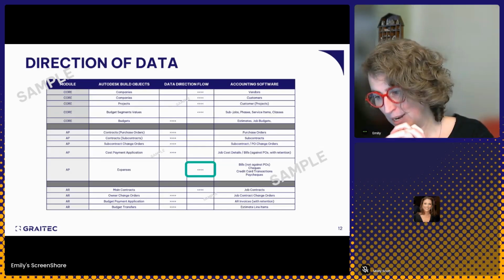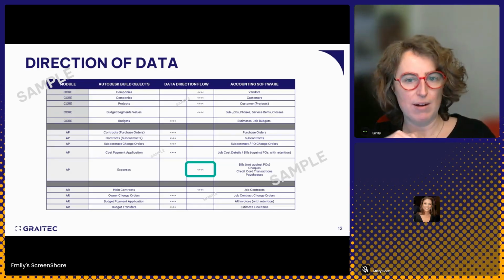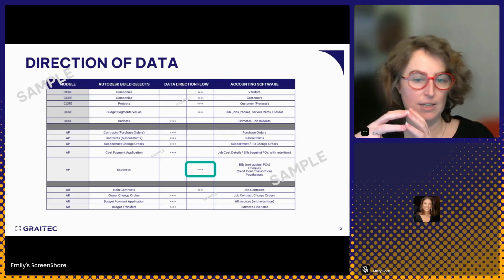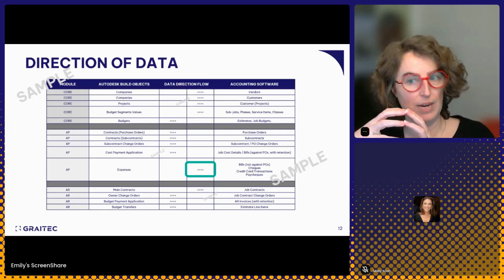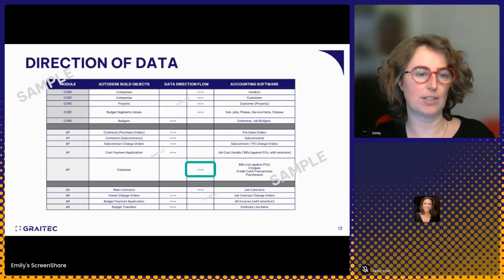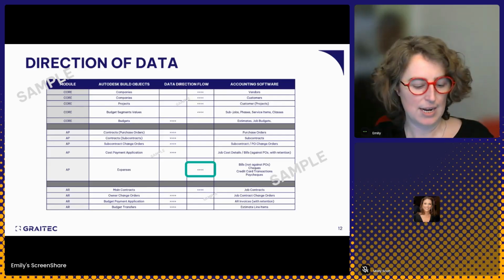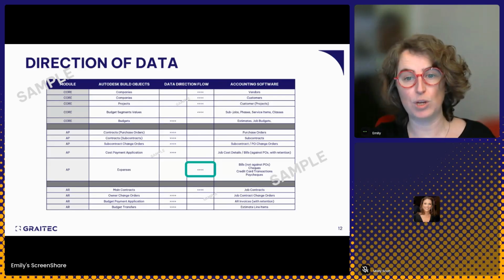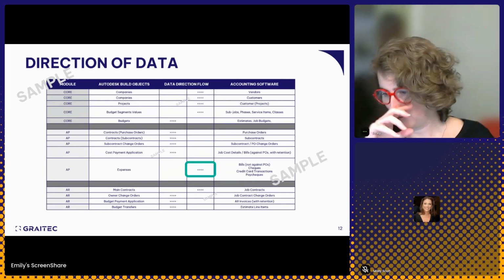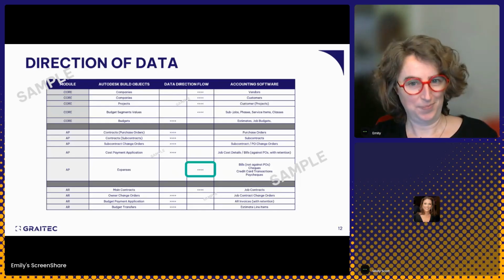Now, contingency planning, I think that's part of it. If you are aware that you're going to overrun on budgets because the forecast and a few months of actuals are leading you in that direction, and you have contingency costs stashed away that are available to bring into the project, then that's what you can do at that point: utilize any contingency information. I hope that sounds like a reasonable answer.